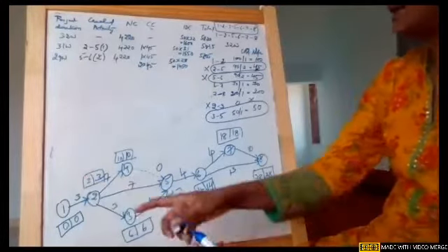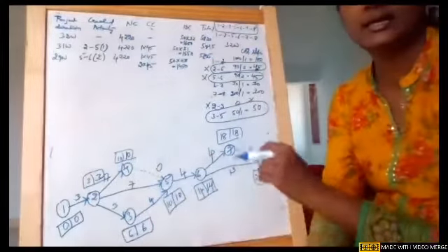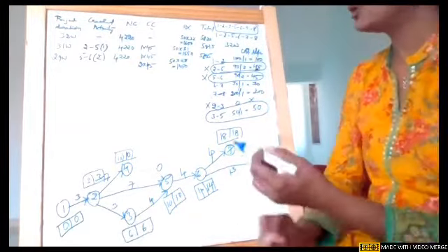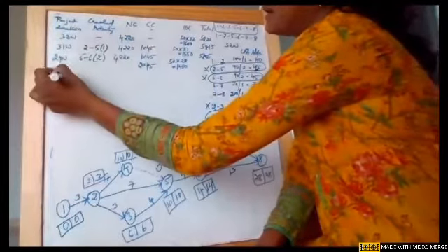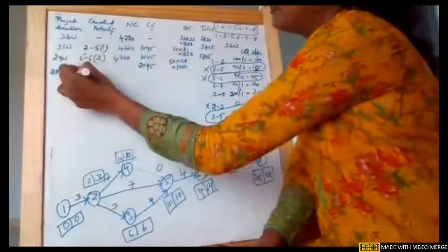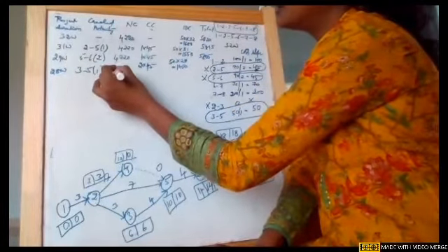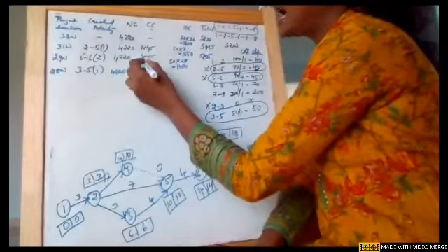Now if you see what happened, girls, all the durations, if you see the entire path, the entire network is critical. So in such a scenario, we need to see what happens. We will first see the cost. So now again, it has been reduced by 1 week, 28. The activity which is crashed is 3, which by 1 week has been reduced. So the normal cost is 4220. And then this adds up.